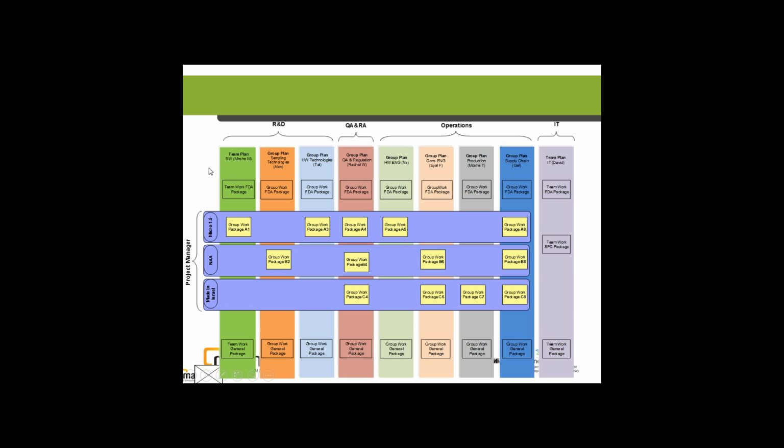So the team manager could actually see everything that people from their team are working on and also allocate them to the different tasks. And then the project manager, who is really a project coordinator, is able to view the different work packages from the different teams in one master file, but he or she is not actually in charge of changing or updating things.